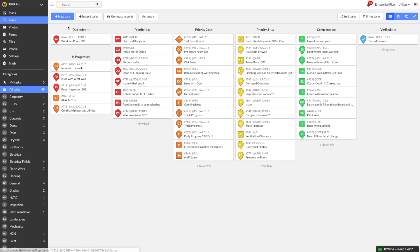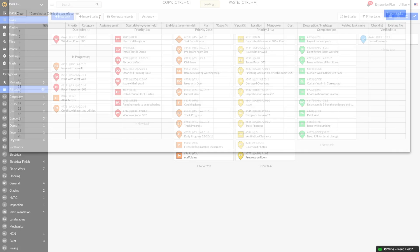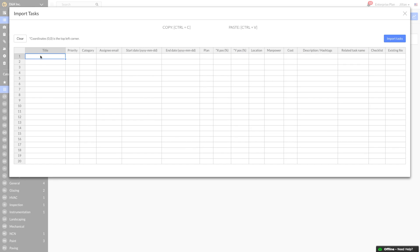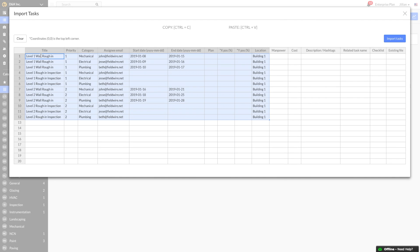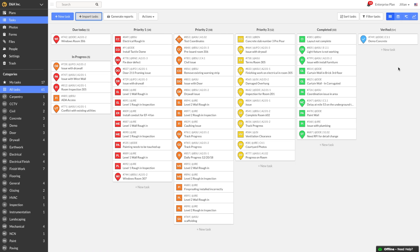I can create individual tasks, or quickly create multiple tasks with the task importer. Click Import Tasks in the upper left, then all I need to do is copy and paste in the line items for my three-week look-ahead. I've also included the priority, category, assignee, and start and end dates of each activity. Once I click Import Tasks, each individual task is created and my sub-trades are instantly notified.